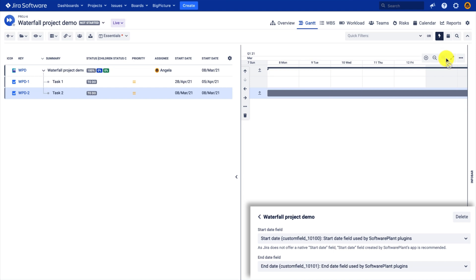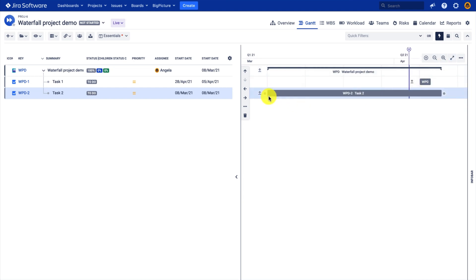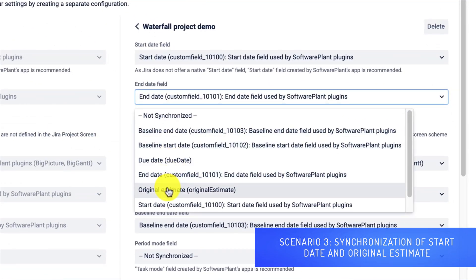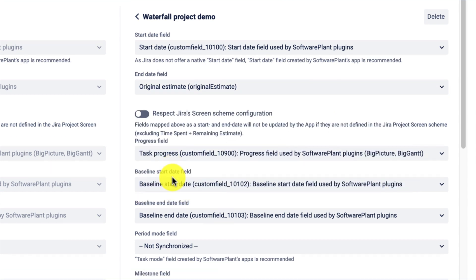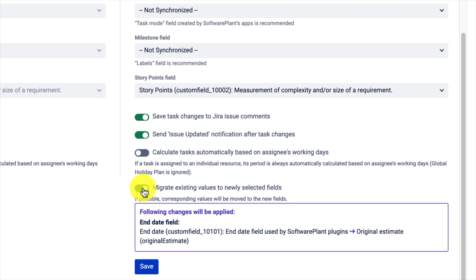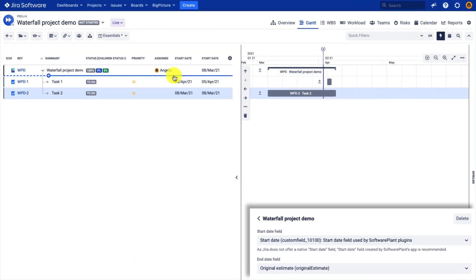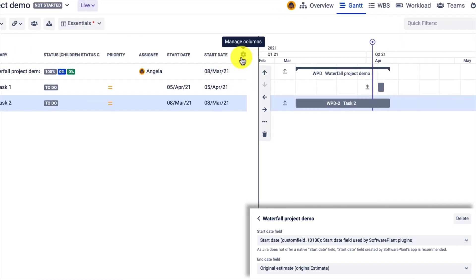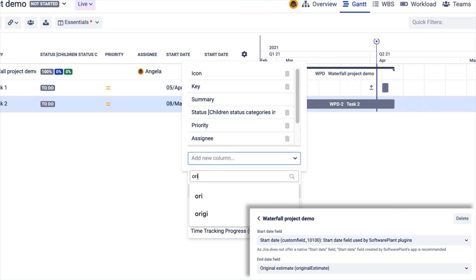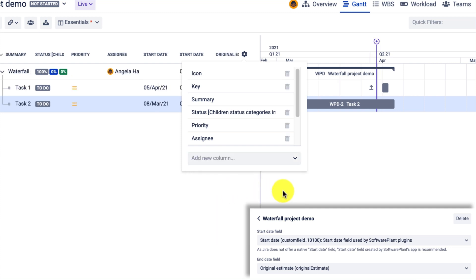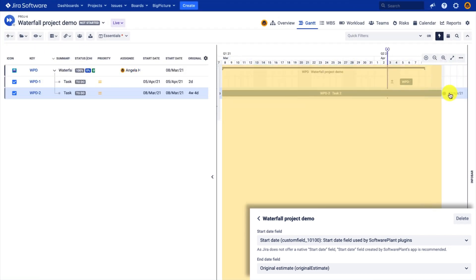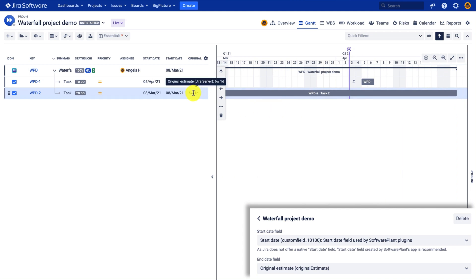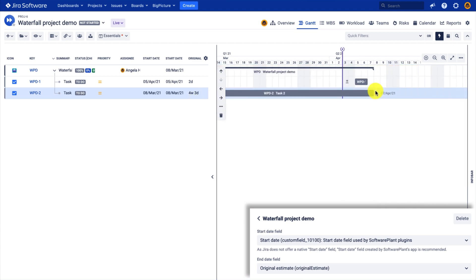My task was rescheduled and it now starts in March. For this last scenario, instead of using the end date, we can select the time tracking's Original Estimate or Time Spent plus Remaining Estimate, and we can convert the duration of your tasks to the effort. If we look at the Gantt chart, this time adding the Original Estimate field, the effort is exactly equal to the duration. If I drag and drop the right edge, you will see that the Original Estimate or effort field will be updated, and the end date field is no longer synchronized and will not be updated.